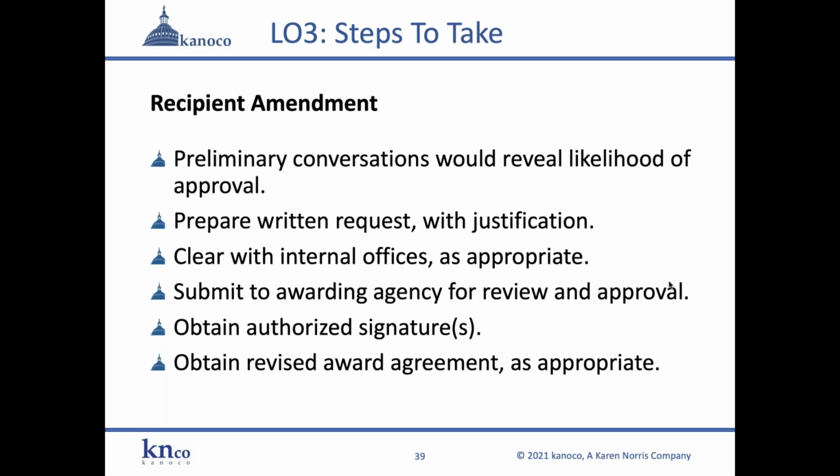And then you would prepare the written request with your justification. You'd clear it with the internal offices as appropriate so they can update their records. You would submit it to the awarding agency for review and approval. You would obtain authorized signatures, and you would obtain the revised award agreement as appropriate.